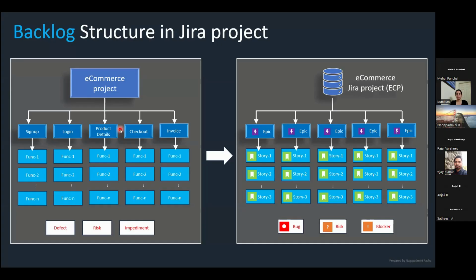Sometimes it's not the same individual working on 2 stories. Your developer will be working on the development part, and your tester might be working on the QA part, right? So either they work simultaneously or it will be sequential. These 2 points of development are always done because the developer has completed it. The testing part, the QA, may or may not complete. So that will be there in the testing column and left over. There will be only 1 or 2 story points as spillover rather than 5 points.